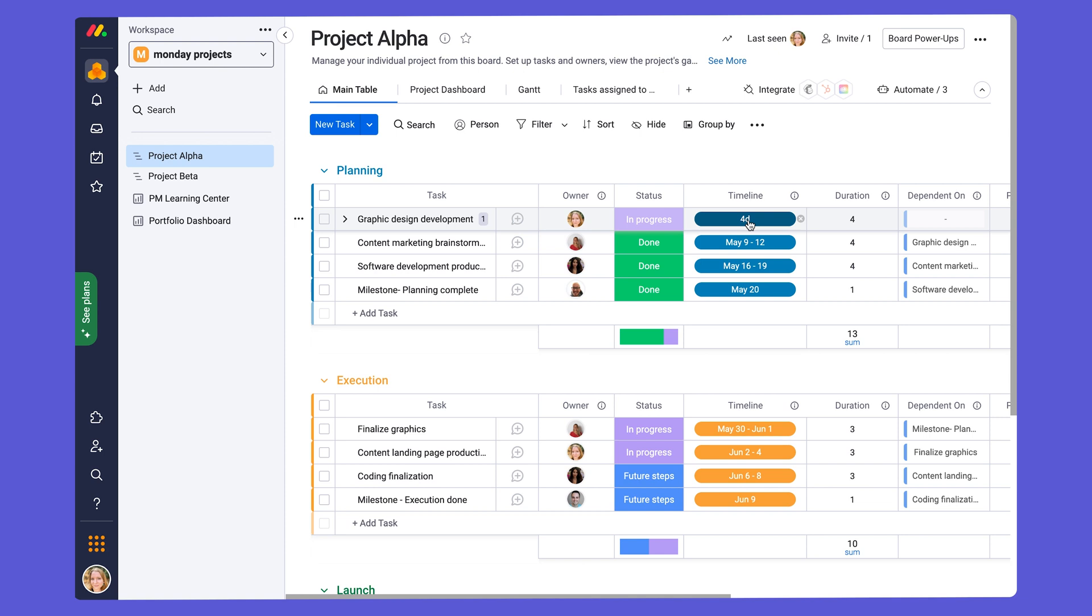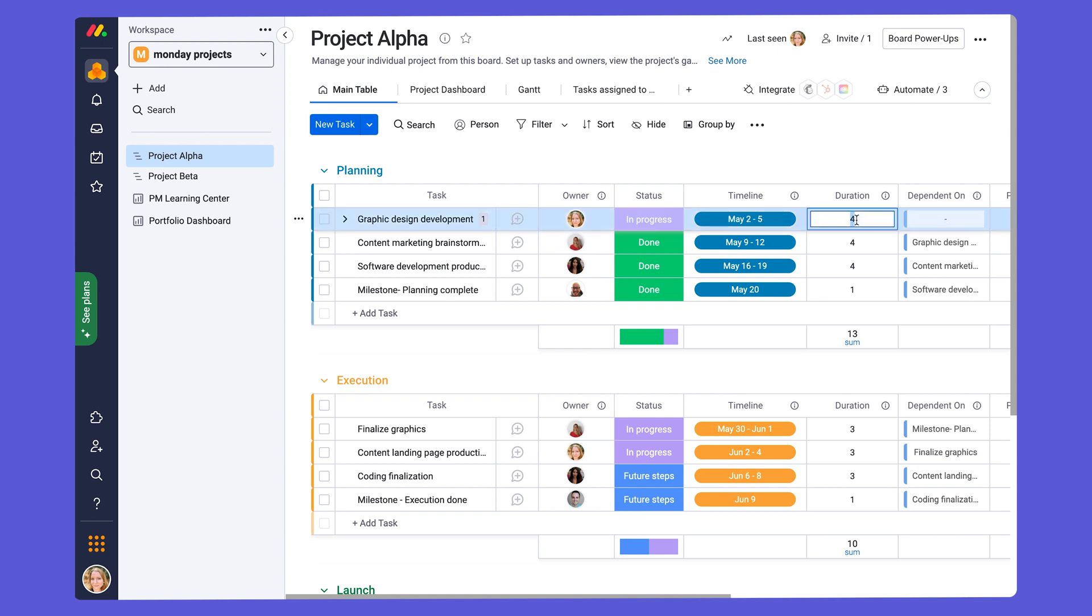The second way we can do it is using the duration column. And this is a combo column, the timeline and duration column. So whatever is changed in one will be reflected in the other. So say if we wanted to add the duration of our task as five days, we'll put five here. And we'll see that it'll automatically be reflected in the timeline column.